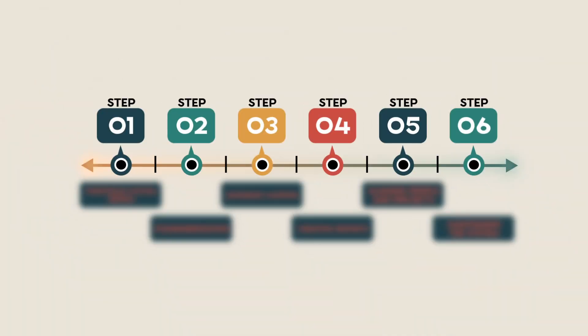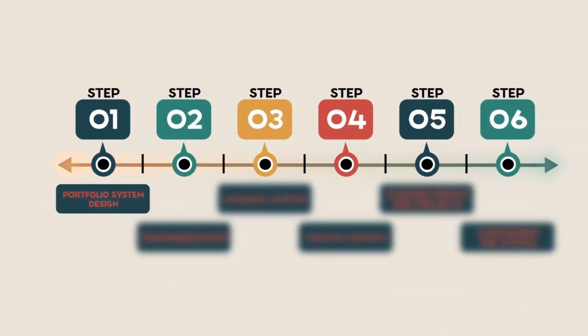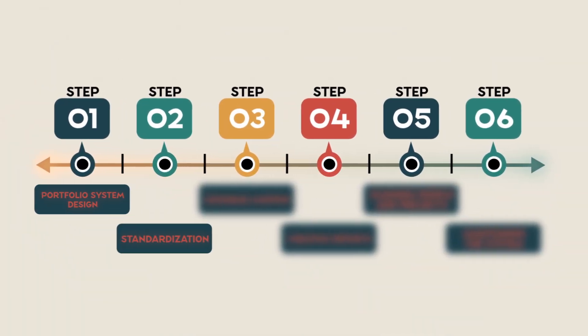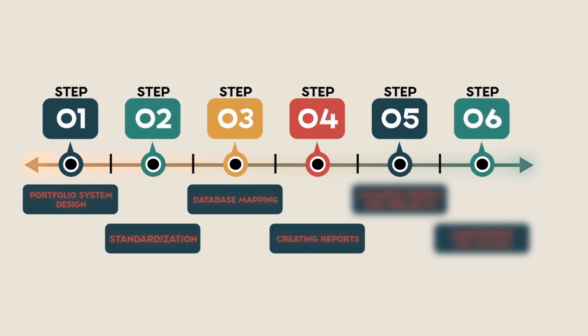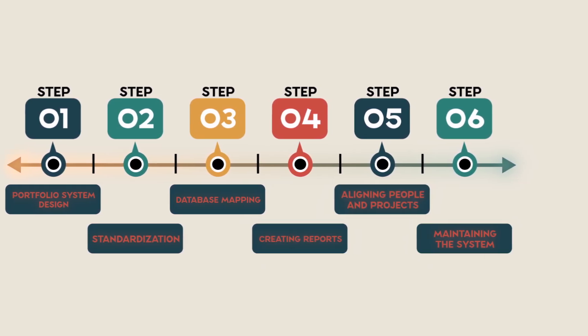This approach works whether your projects are tightly integrated or if they're completely independent. The six steps we are going to cover are portfolio system design, standardization, database mapping, creating reports, aligning people and projects, and maintaining the system. Let's get started.